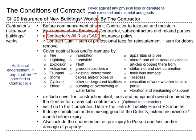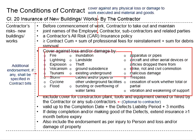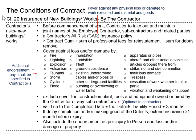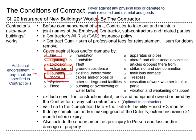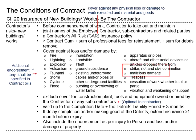The Contractor's All Risk insurance should cover against losses or damage caused by a list of events, including fire, lightning, explosions, volcanoes, tsunami, storm, cyclone, flood, and many more. Some are due to natural causes and some due to personal or geopolitical threats. All these are specified in the PAM contract, and insurance companies have a standard CAR policy.